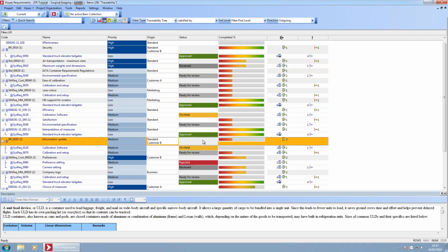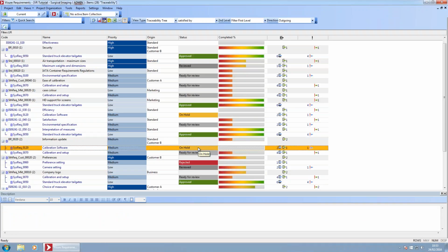But if I have several requirements, by advancing them to a further stage, I will automatically advance the high-level one also. So this is what we can get by using a professional tool. We can use the traceability information to update the high-level requirement based on the modification of the low-level one, and also the other way around. This is just a silly example of what we can get, but I want to show you how we can exploit the traceability information.